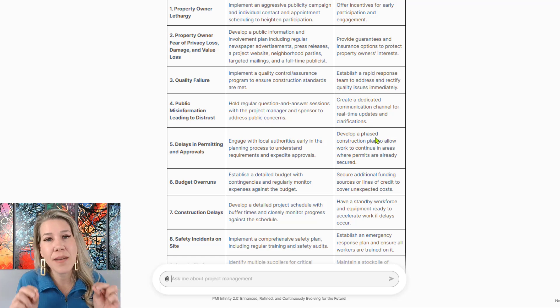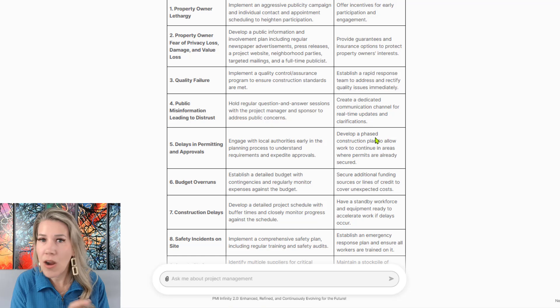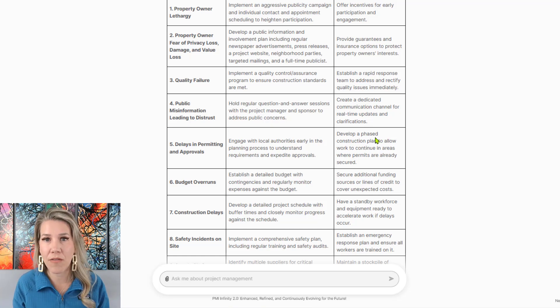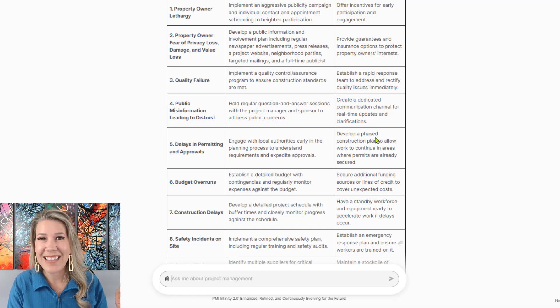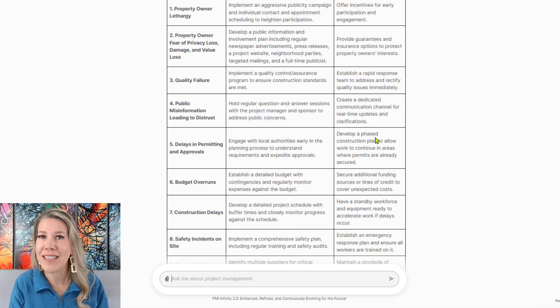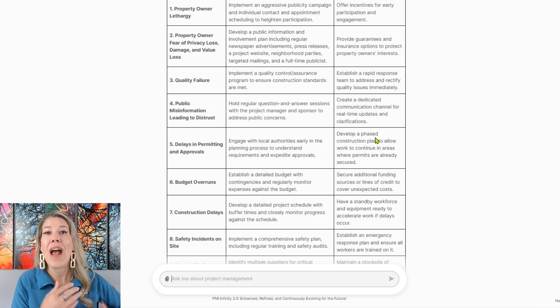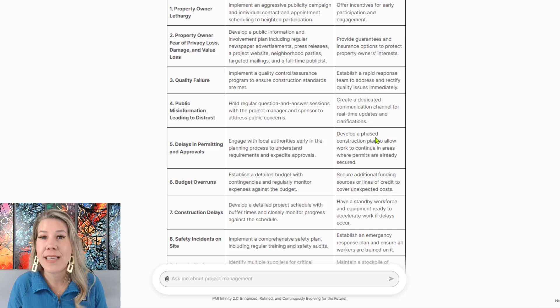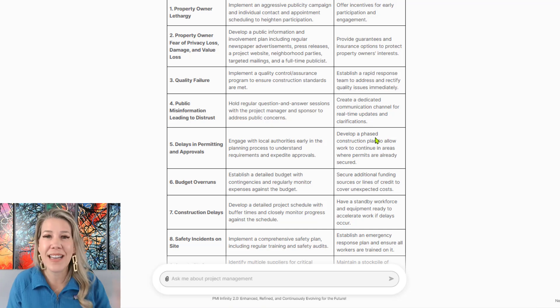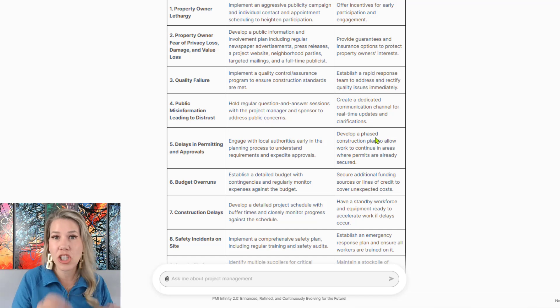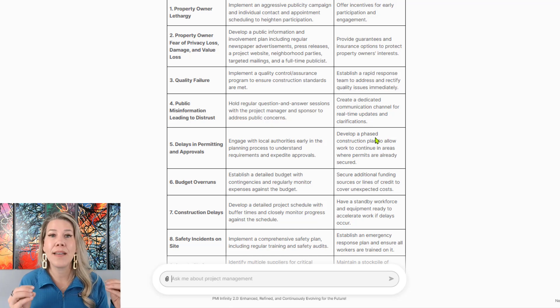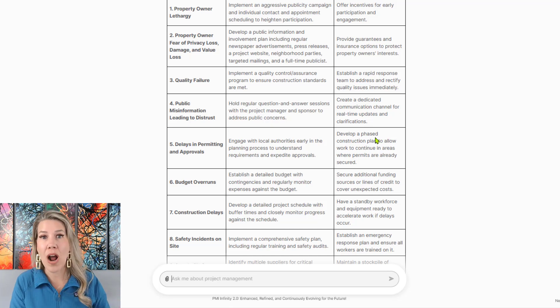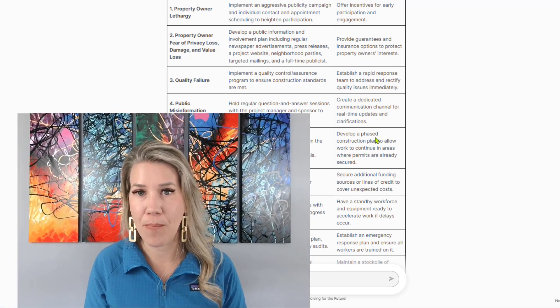So if I don't like some of the answers here, and that's important, use this as a draft. Don't copy and paste this and use this as a work deliverable. Generative AI does make mistakes. It sometimes spits stuff out that doesn't make much sense, at least to me. And so you have to refine it. I may say, now let's boil this down to the top five risk. And I don't like the contingency plan associated with number five. So let's change it to be this. But you get to keep going back and forth and making the product or the outcome better and better and better.